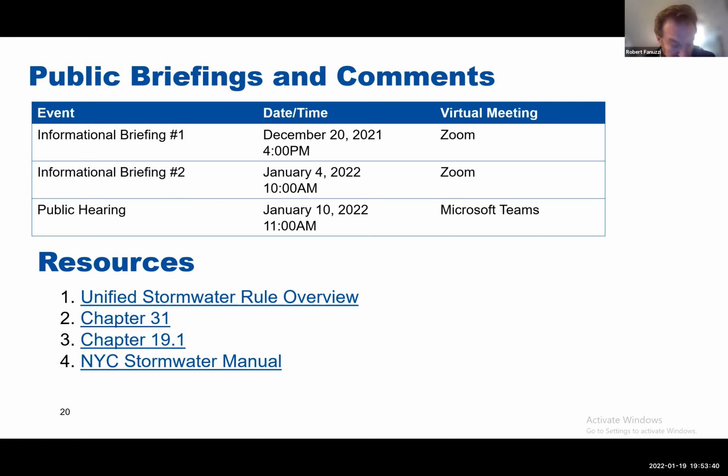Will DEP be the examiners for all of the rules, or will you be engaging DOB for any purpose? That's a good question. It depends. For the site connection proposals, the chapter 31 parts of the rule, DOB is the entity that determines if a site or house connection proposal applies. So it goes to them first and then comes to us. Then we do the plan review and the proposal certification.